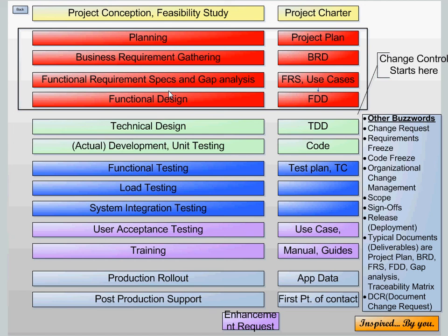As part of user acceptance testing, users will try to do the scope creep, and your job is to ensure that they can't do any scope creep. When the UAT occurred, users said this is what they wanted. I showed them the original scope definition documents and the business requirement definition documents, and they looked at those and said, okay, yeah, this is not what they asked. They signed off on something else. Scope is a very important thing. I've written it here as a very important buzzword.